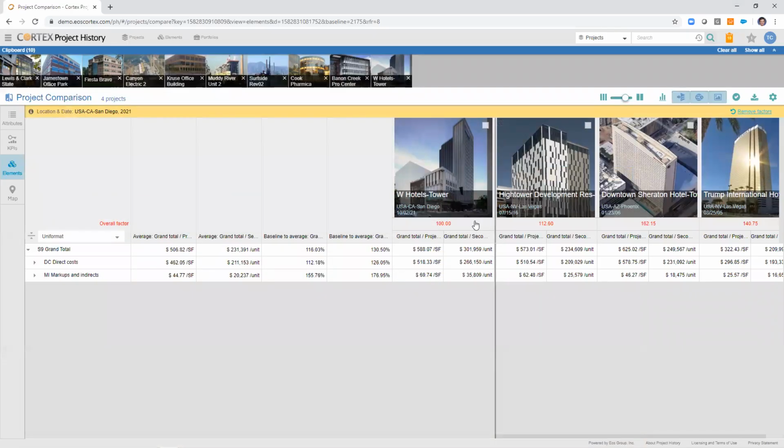So that's one standard. Save a collection, call it your gold standard for a certain type of project, easily import new information and baseline it against that collection.